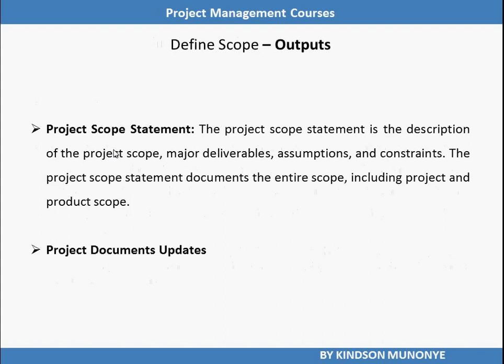A little more on the project scope statement. The project scope statement describes in detail the project deliverables and also the work required to create these deliverables. It also provides a common understanding of the project scope among stakeholders. It may contain explicit scope exclusions that can assist in managing stakeholder expectations. It enables the project team to perform more detailed planning, guides the project team's work during execution, and provides the baseline for evaluating whether requests for changes or additional work are contained within or outside the project boundaries.